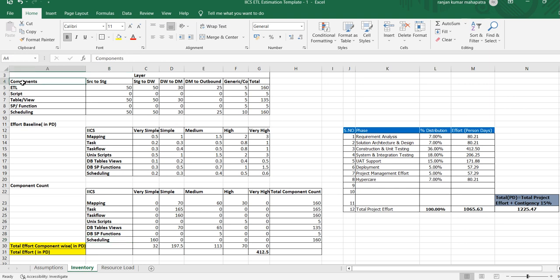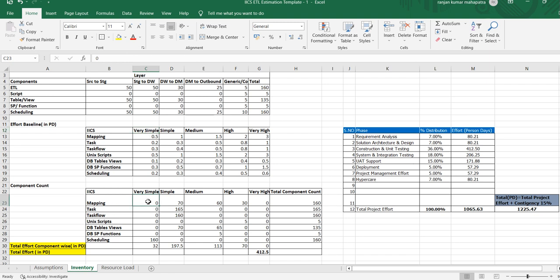You can see the components: sources, how many mappings, how many scripts, how many tables and views, stored procedure functions, and the scheduling part. Then, we have defined the complexity of each adapter task — very simple, simple, medium, high, and very high. Then, the effort required for those components. At the end, we calculated as 412.5 person-days. That is the build effort.